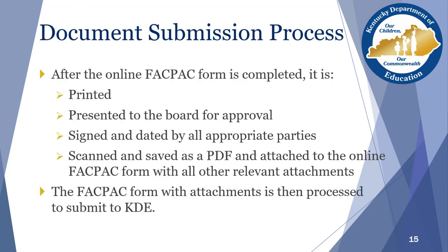Okay, your document submission process. After your online FACPAC form is completed, it's printed, brought before your board for approval, then it's signed and dated by all appropriate parties. Then it's scanned, saved as a PDF, and attached to the online FACPAC form with all other relevant attachments. The FACPAC form with the attachments is then processed to submit it to KDE.